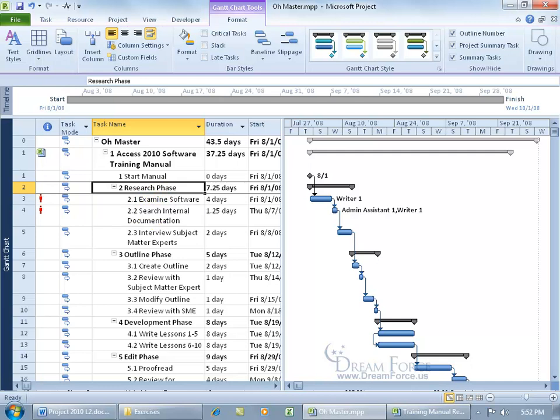Now, you can do it that way, but the other thought that I had is, when it comes to your master project, that you create your own custom WBS code that not only breaks down the structure by the outline number that you see here, but also displays the name of the subprojects and their sequence as related to other subprojects in the master. How about if you do something like that?